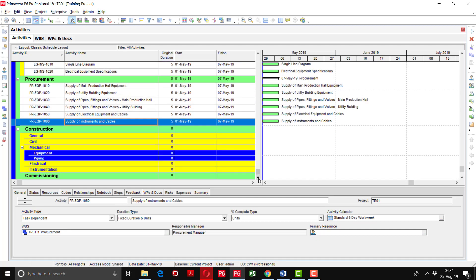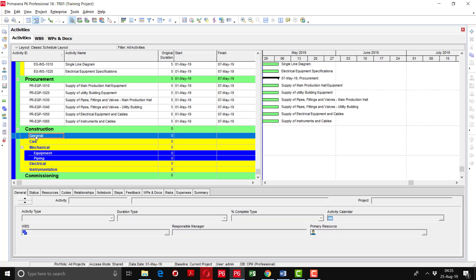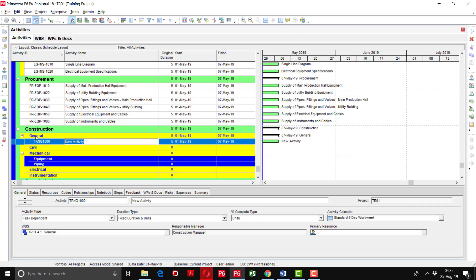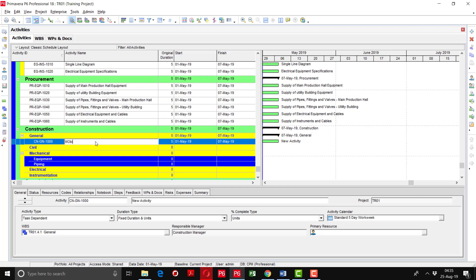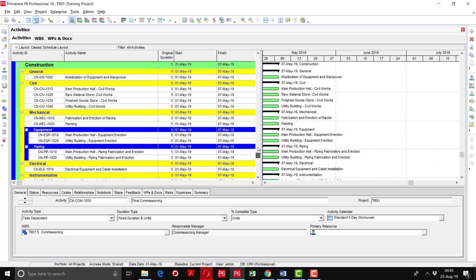Now define the Construction activities. Go to the General WBS and add activities using the Insert key or Add button. Use the Activity ID notation: CN for Construction, GN for General — for example, CN-GN-1000 — and name it 'Mobilization of Equipment and Manpower', since at the start of construction we need to mobilize equipment and manpower on site. Continue adding all remaining construction activities. The complete activity list has now been created across all WBS elements.